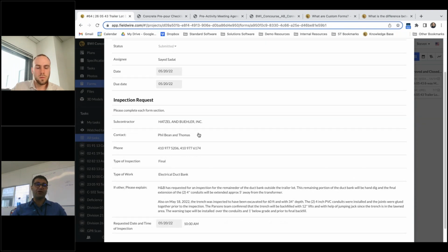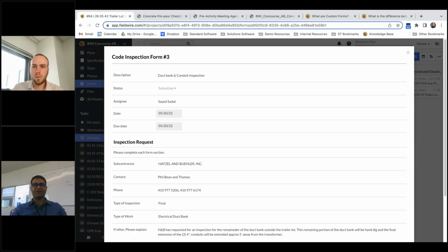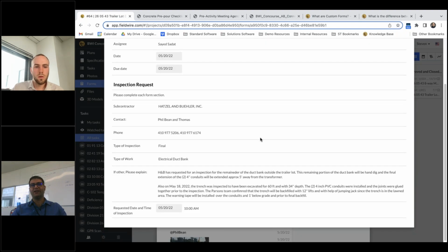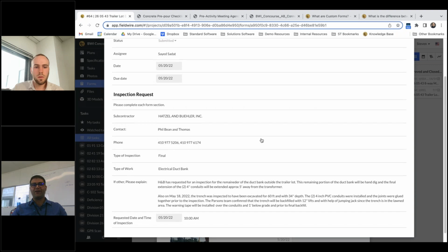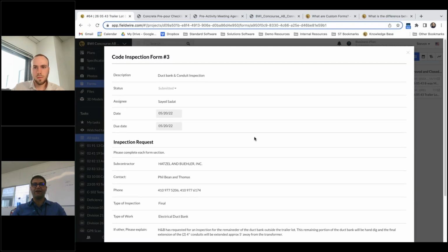The code inspection, which is the owner's representatives, and we send them this invitation through an email, and this form gets assigned to them with what time we need the inspection and when we need the inspection. But prior to that, as part of the quality, we ensure that our work is done before sending this form to them. So we track these invitations on all these checklists at the same time, while having all these checklists as a form so that they can sign it, and that way they can track it so that we have everything in a proper manner at the end of the day.